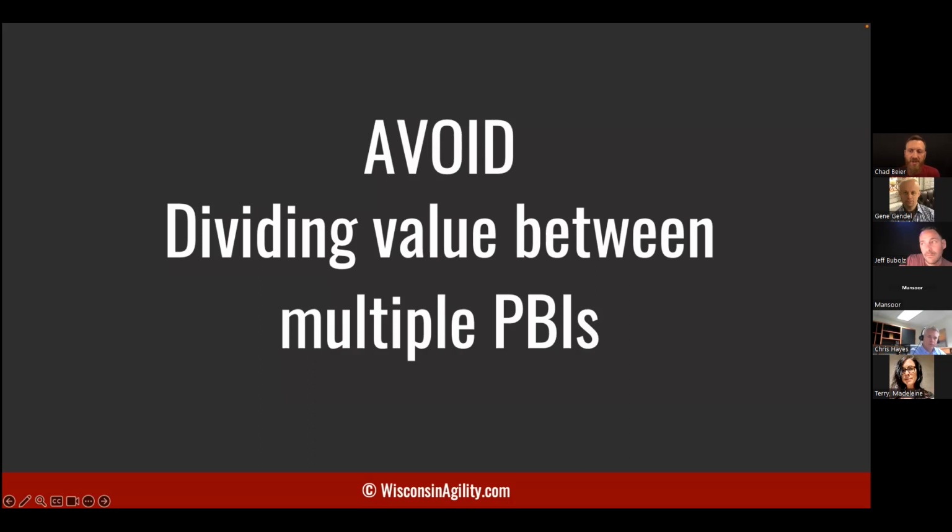And there's a question from Matt in the chat: finding that often features are confused with outcomes. So any guidance on how to avoid that? Yes. A feature typically will have much more of the "what" language, meaning it's describing what you want to do, but you haven't captured the why. So every time you look at a product backlog item, ask, why am I doing this? Well, why am I doing this? Well, why am I doing this? If you ask it 3 to 5 times, you'll typically get to the outcome statement.